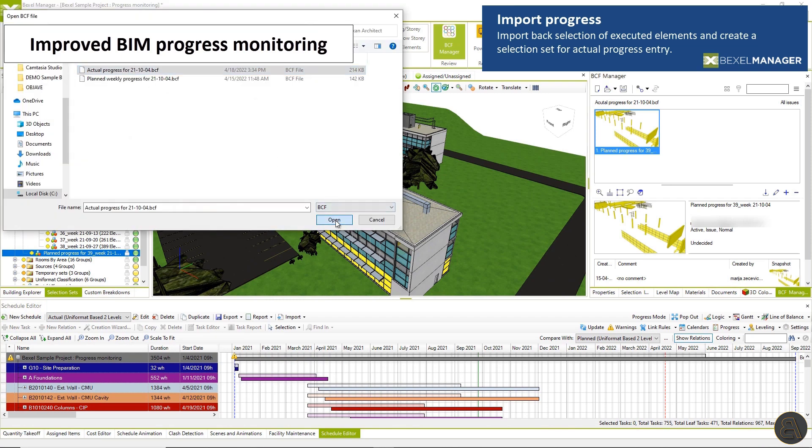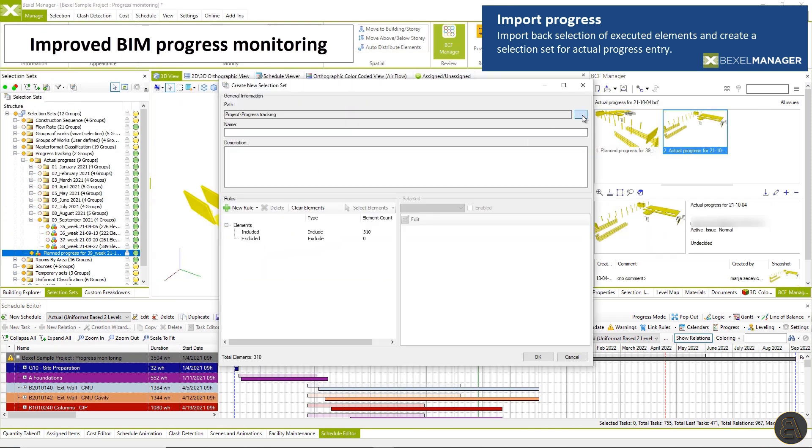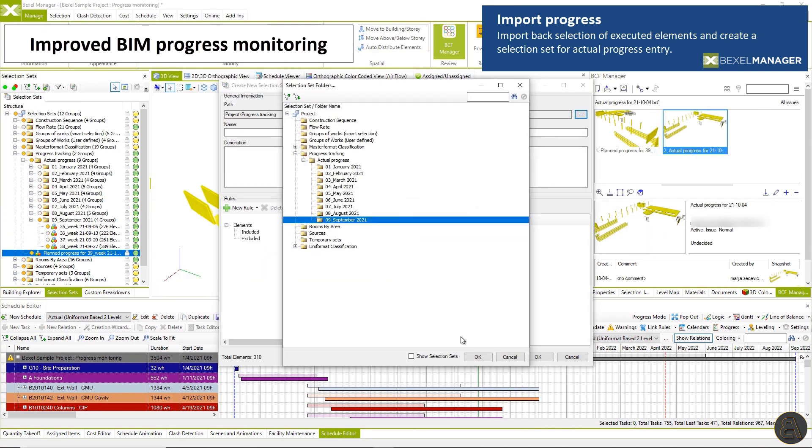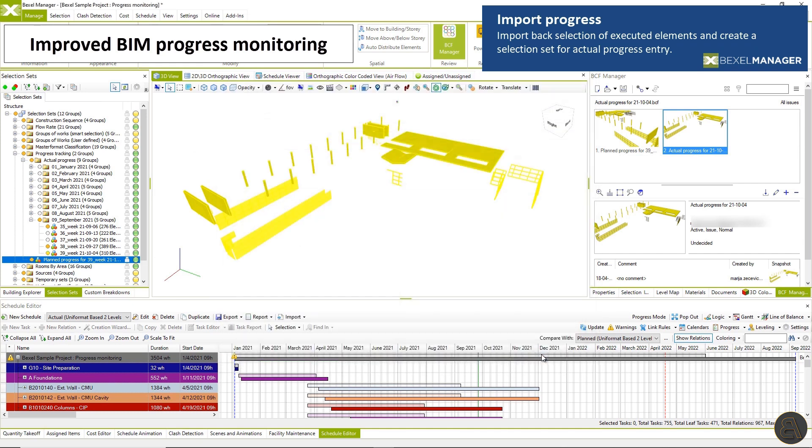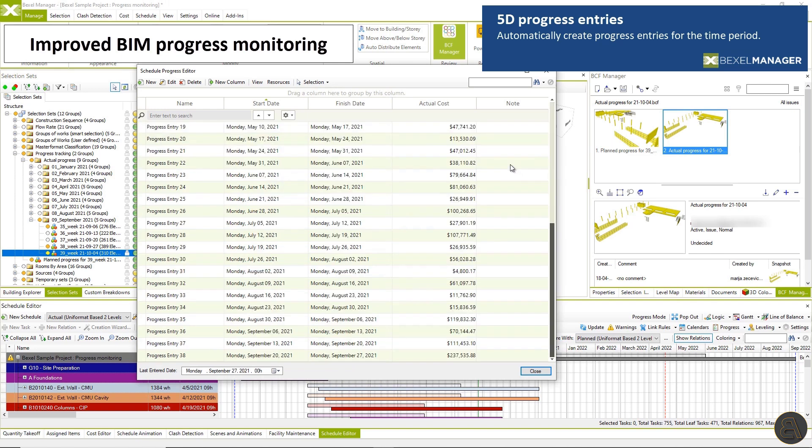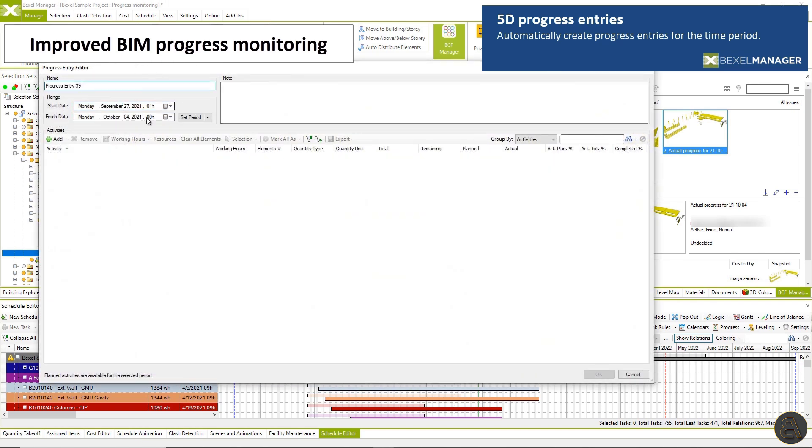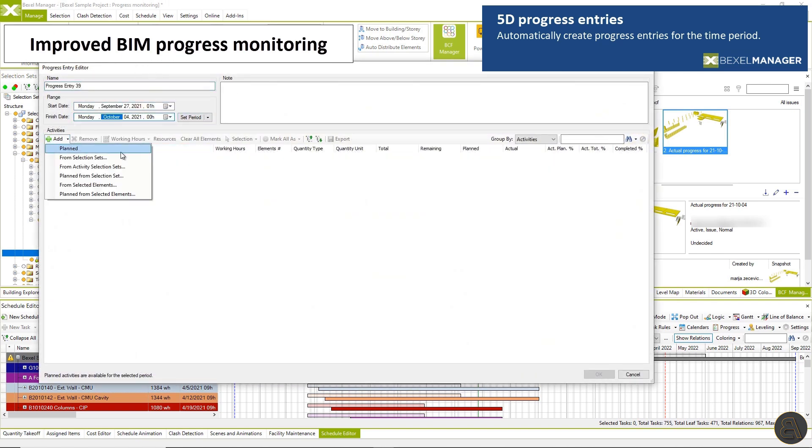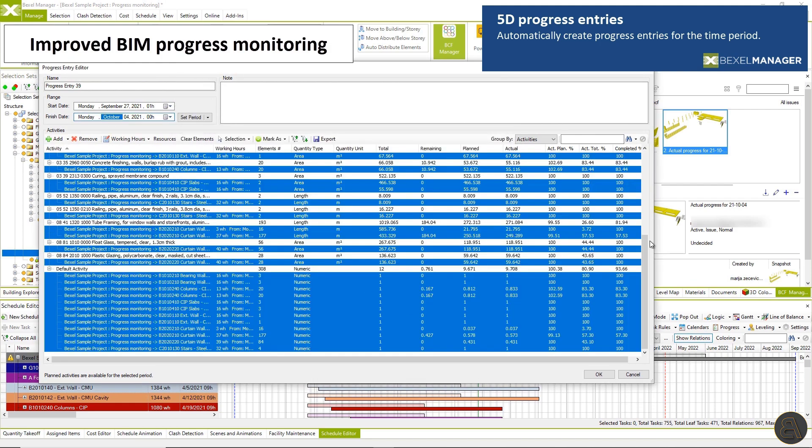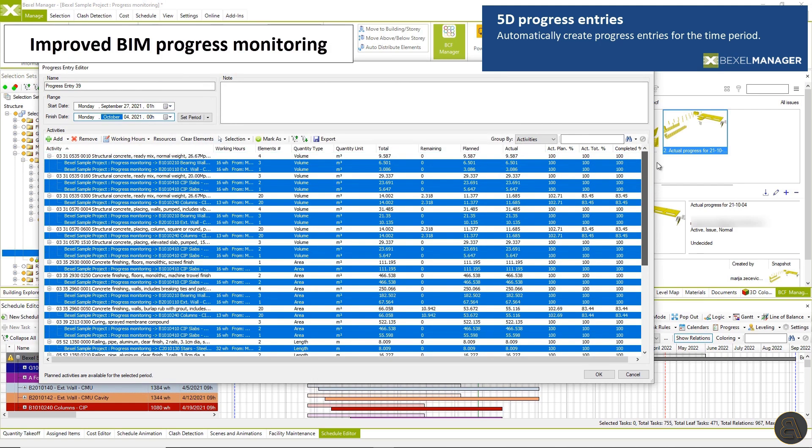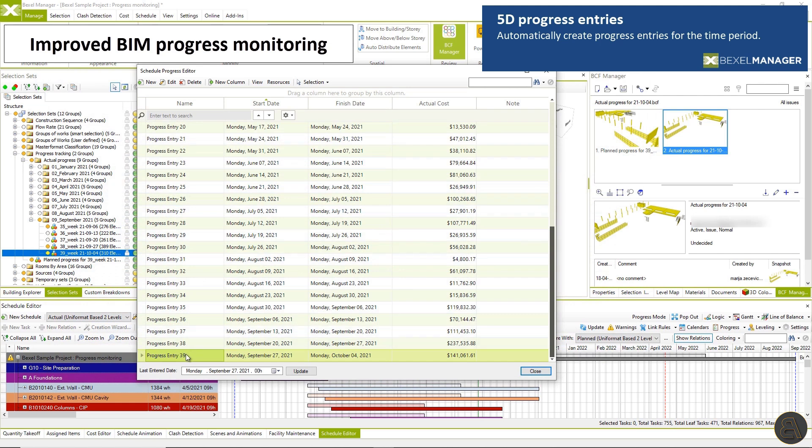Once you import back the selection of executed work, create a selection set for actual progress entry. Automatically create progress entries for the time period. Check completion, remaining quantities, cost and quantities per executed activities, an actual cost for created progress entry and so much more.